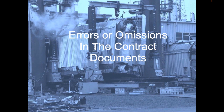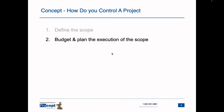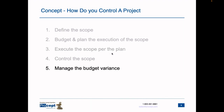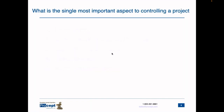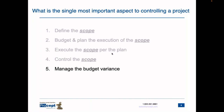The first issue is errors or omissions in contract documents. From my perspective, this starts in the design office. We'll look at some basic project management to understand how projects are developed, which leads to how well the contracts are written. To control a project, you define the scope, plan the execution, execute with the plan, control the scope, and manage budget variances. The single most important aspect of controlling a project is scope. If you have poor scope, no matter how well-written your contract documents are, you'll have a lot of trouble in the field.